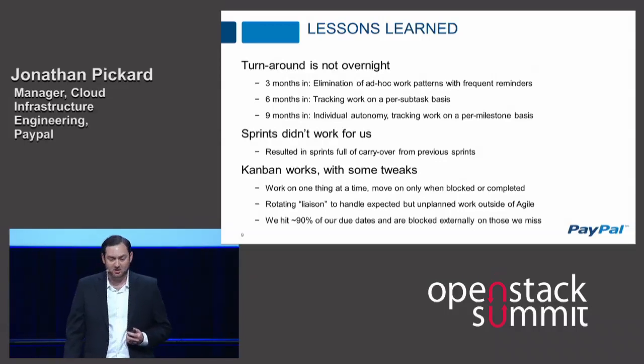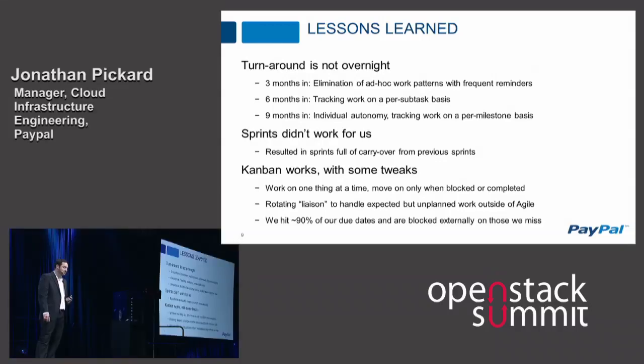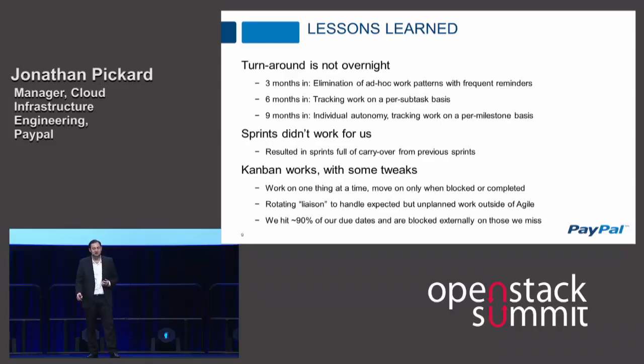Now, looking back at my previous example of our production data center deployment, all 53 subtasks, our next production data center deployment was tracked by milestones, 4 of them, that aggregated each of those subtasks and gave autonomy to the executor to do what was needed in the order that they deemed appropriate. Engineers liked this autonomy, and it was critical in our journey and ongoing success.